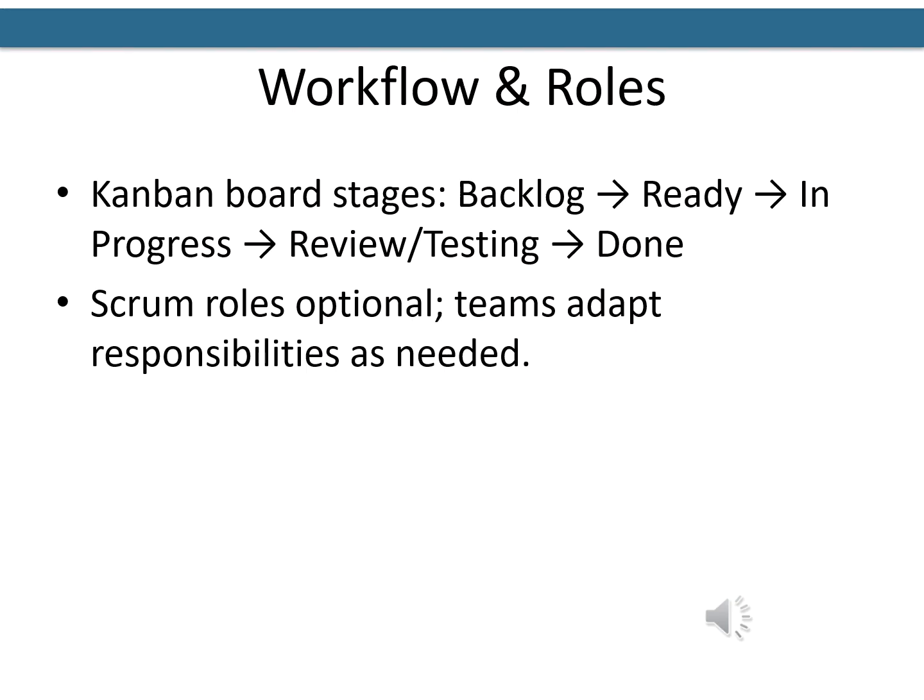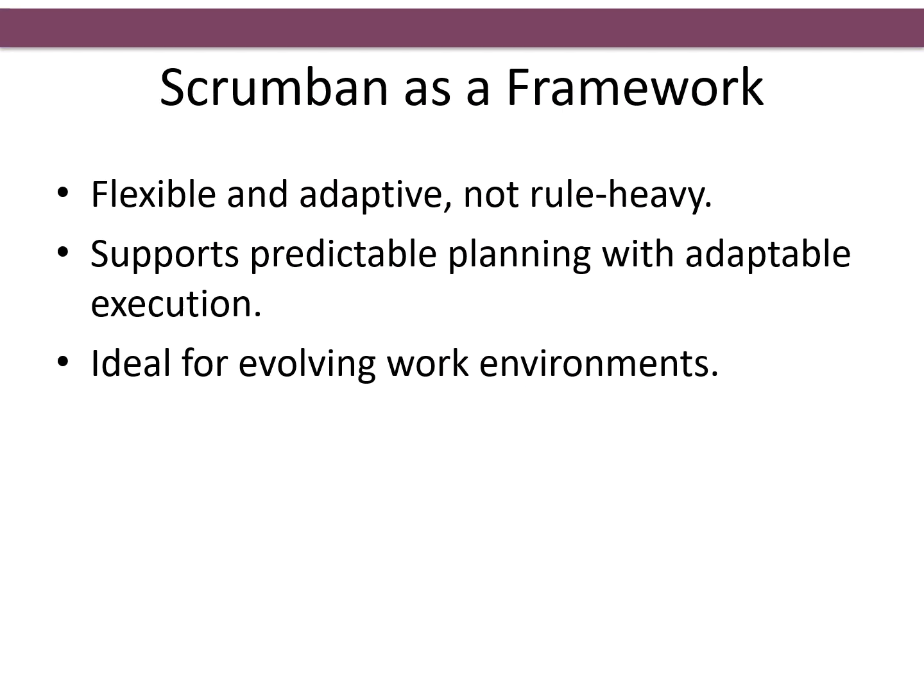Another important part of Scrumban workflow is that planning happens on demand rather than at fixed sprint intervals like in Scrum. That means teams pull new work only when they have the capacity, which leads to steadier flow and fewer interruptions. Scrumban functions as a flexible framework offering guidance rather than strict rules, which lets teams adapt to their specific workflow needs.